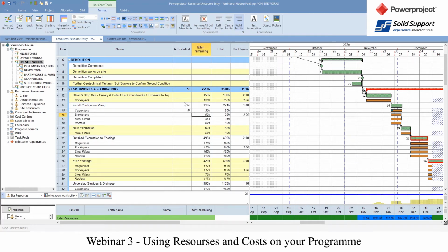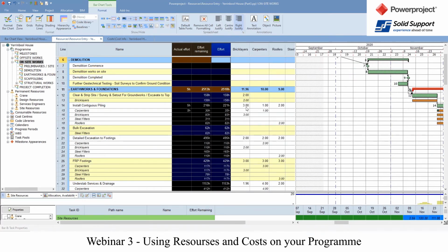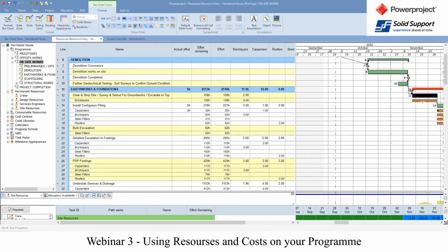And again, you don't have to do this. Resourcing, this is different grades of how you resource. So you may simply just want to assign your resources, as we saw here, by a number of people and just allocate it and let it progress from the task, all the way through to actually capturing that information week by week of how much time people have done and how much they've done. This allows you to start using earned value reporting against what you've done and what you're expected to do.